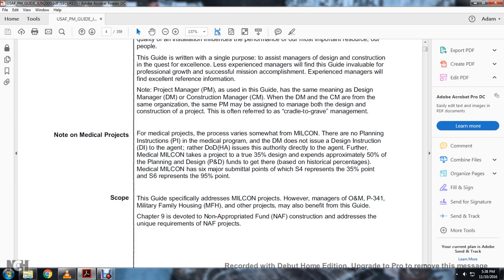For medical projects, the process varies somewhat with the military construction. The design manager does not include the design instruction to the agent. Rather, the Department of Defense HA issues authority directly to the agent. The medical military construction takes the route of 35% of the design, expanding to approximately 50% of the planning design funds. Based on historical percentages, the medical military construction has six major submittal points — the 35-point and the 95-percent point. The guide specifically addresses the military construction project P-341 military family housing. Chapter 9 is devoted to non-appropriated funded construction.